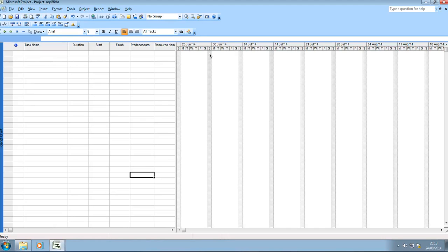In the previous lesson we said that we would be allowing Saturday morning work, and as you can see only Sunday is now greyed out and Monday to Saturday is available for work. When we enter dates into Project, it will now automatically account for the number of days. So if we allow 9 days for something from Monday, it'll take off the Sunday and extend the project into another working day. So Project will take that into account for us.